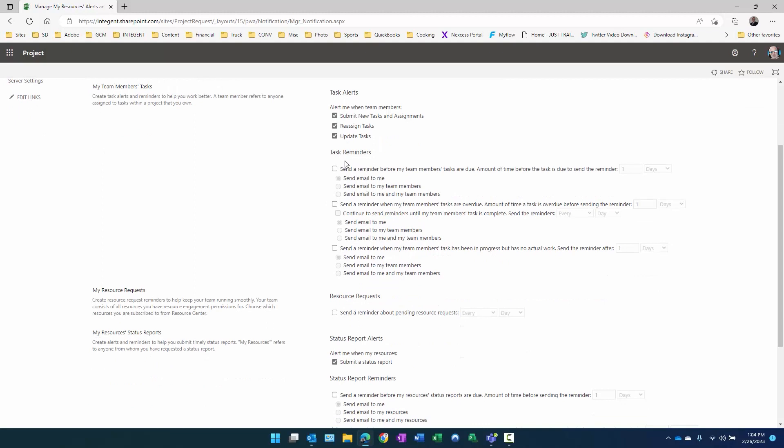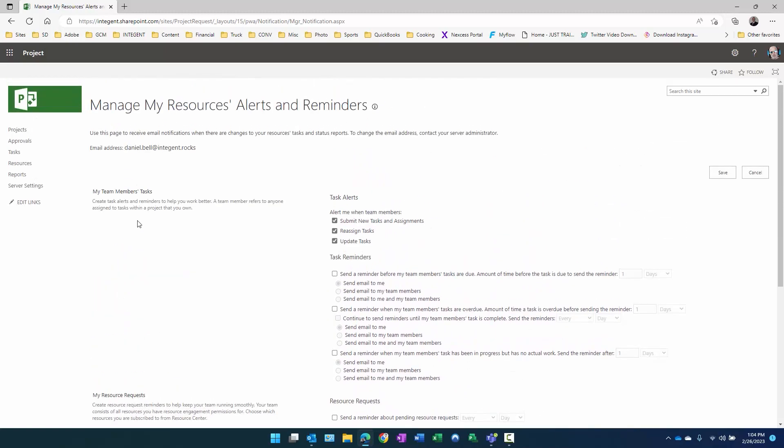These ones are similar to the ones we showed you in the set my alerts and reminders. If the reminder before they're due, the amount of time before they're due to send the reminder, send the email to me, send the email to my team members, send them to me and my team members. There's a lot of capability here for sending different reminders. Send a reminder when my team members tasks are overdue, amount of time overdue before sending it. Who do you want to send the reminders to? Me, my team members, me and my team members. And then lastly, send a reminder when my team member task has been in progress but has no actual work. So meaning the start date has passed, but there's no actual work. I'm not going to cover the rest of these because they're not used nearly as often. We're going to stick with the defaults. Let's show you how these work.